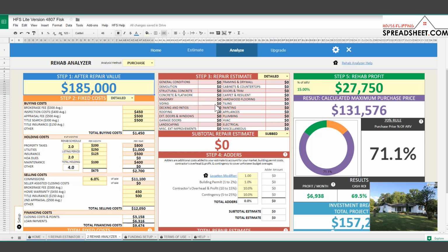In this scenario, we actually haven't walked the property yet. We've basically just driven by the outside. We're assuming that we're probably going to need to gut the property and do a remodel of the kitchens, bathrooms, all new finishes throughout. And based upon our experience, we're generally at about $30 to $40 a square foot. So we are actually not going to use the detailed estimate, but we've got a couple other options for you.